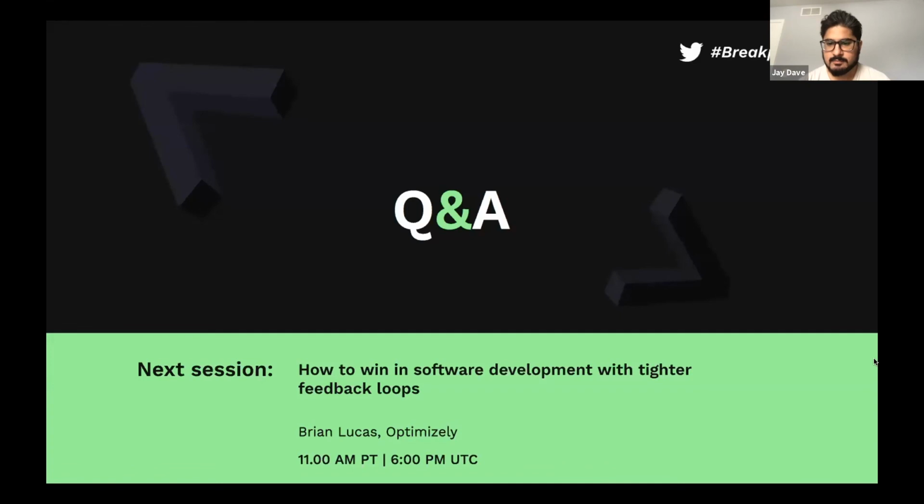So I'm going to take the last question. What was the reason for the higher failure rate earlier, and how did you bring it down to the level that it's at right now? Yeah, the 21% failure rate had to do with too many things getting crammed into a monolithic release that just collided with everything, and we didn't have enough maturity or tooling to catch everything. That's the bottom line on it. When we reduced the number of features and made it easier for us to verify that what's going out is actually what's going out, and those things didn't collide with a lot of the different services or other apps, that's when we saw a great drop in our failure rate.